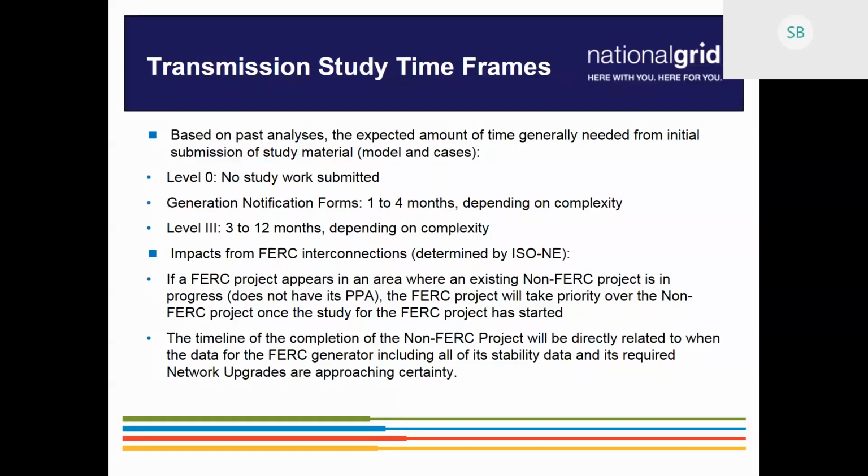And the other big point that I want to make sure we get across and emphasize here is that traditionally, it's been an over 5 megawatt generator, or an aggregate of the same developer, contiguous type property, aggregating to over 5 megawatts, that has triggered these PPAs. That's no longer the case.